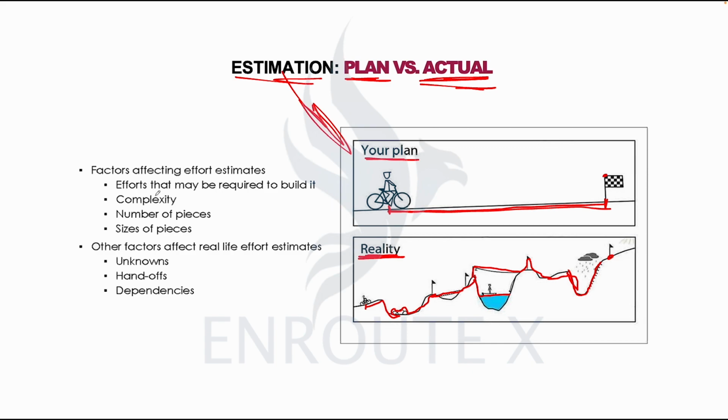So these are some of the factors you consider: the effort that may be required to build it, the complexity of that piece of work, number of pieces, size of pieces, then of course the unknowns, the hand-offs. Hand-offs means the point of exchange, and that happens mostly between the developer and the tester, the time of exchange, which would also impact on that delivery. Then dependencies also. Let's go further. We have some other ground to cover.